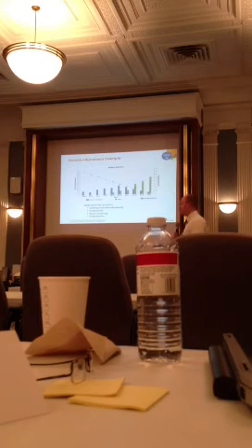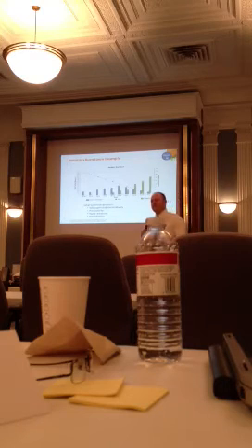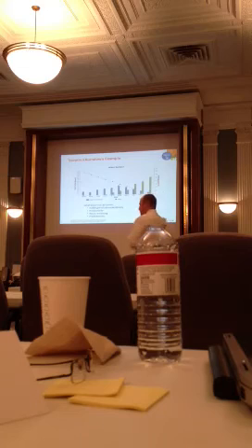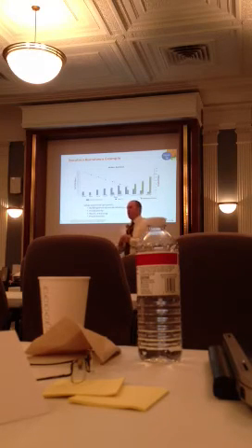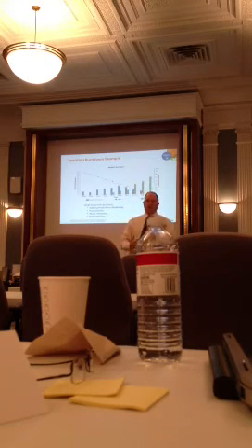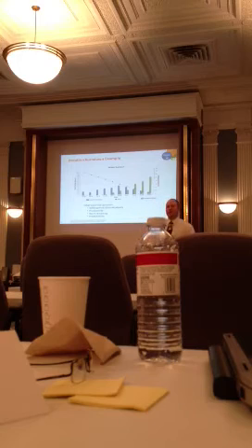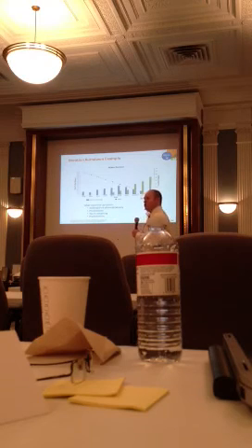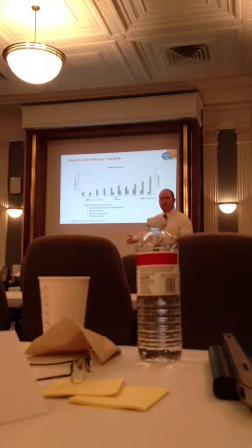However, when I look at this, we only have about 20 hours worth of tasks still remaining. Now I can tell you, because I did a lot of analysis on my team back then, that it was taking us roughly 10 hours, everybody involved, to deliver one story point and get acceptance on it. So when I see we have 25 story points still to get accepted, but only 20 hours worth of tasks remaining, what does that mean to me?